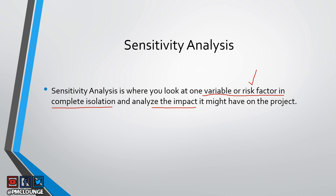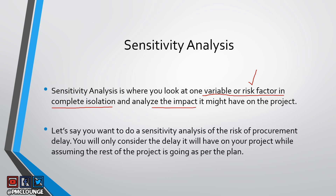In your project, if you had a list of 10 risks, when doing sensitivity analysis you are considering only one of those 10 risks actually materializing, and analyzing what impact that one risk materializing would have on your project. That is what you are analyzing when doing sensitivity analysis.